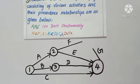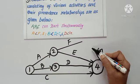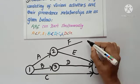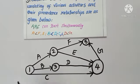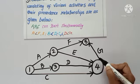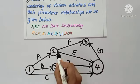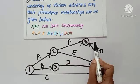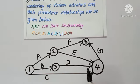We are left with F and G to complete the diagram. So we mark event 5 and connect both F and G to it. Checking the diagram: A, B, C start from event 1; E and F are after A; D is after B; C, E, D all join before G. F has no other successor, so F terminates at event 5. And that is the network for the project with activities A to G.